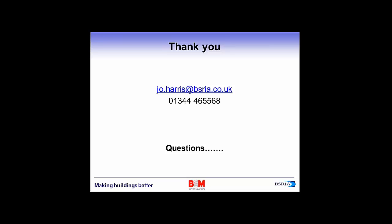Yeah, no, thank you. What is a good rule of thumb when using the construction cost of a project as a guide to determine if BIM is cost effective for a project? In the transportation engineering world, it seems to be justified only on the mega projects, but I would like the trend to be that BIM is progressively more widely used on smaller projects as well. Actually, that's what the BIM task group found when they originally started back in 2013. They put a project limit of £5 million on central government projects and said nothing under that would need BIM. But actually, they've taken that away now, and they've said where BIM adds value, you have to think that through as a project, then use BIM.